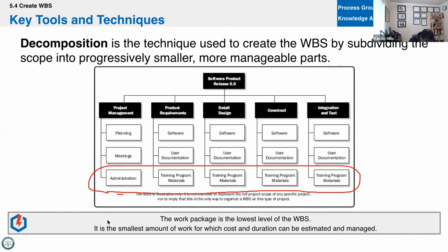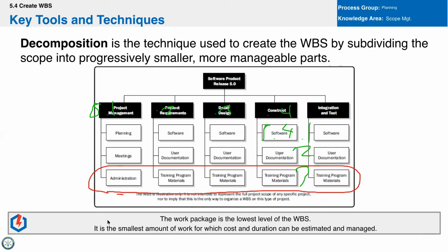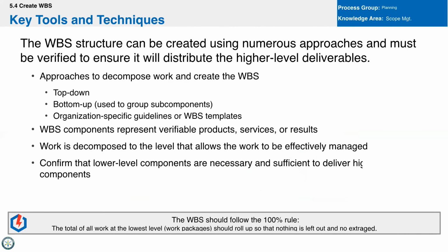If we had, let's say, let me choose the right color here, something that's bright. Here's a green. If we had, let's say, a 5, this would be like a 5.1. This would be a 5.2, a 5.3, 5.4, so on and so forth. And then this would be like a 5.4.1, and then 5.4.2, and then 5.4.3, something like that. So your typical WBS would look something like that. That's your code of accounts. Okay. So then in the work packages, that's where your dictionary lies?